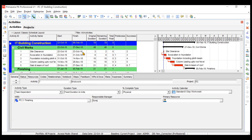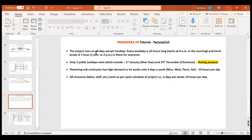Similarly, some resources also have calendars. For example, a concrete pump may not be available every day, or a plastering gang or mason's crew may not come to the site on a regular basis. Based on that, you have to create calendars for your resources, activities, and projects, and assign them respectively. The first requirement: the project runs every day except Sunday, 10 hours long, starting at 8 AM.